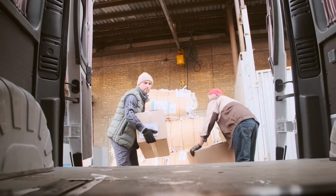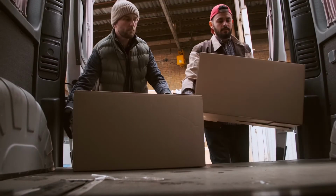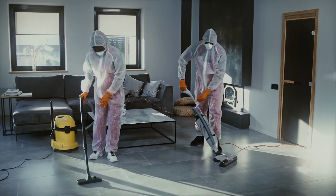Other things you want to consider in your timeline that aren't included in there are what we call logistics. You have to go pick up the materials. You've got to load them all in. You want to include some cleanup time because clean work sites are safer work sites and they are smoother run work sites. You're going to spend time setting up your tools, taking down your tools. These are all parts of what we call logistics. That's going to impose on some of your time. The times I gave you are just for doing it, not for getting everything there. So keep that in mind. You're going to have to go to your local supplier to get the drywall, the 2x4s, the subfloor. So all of that should come into play.